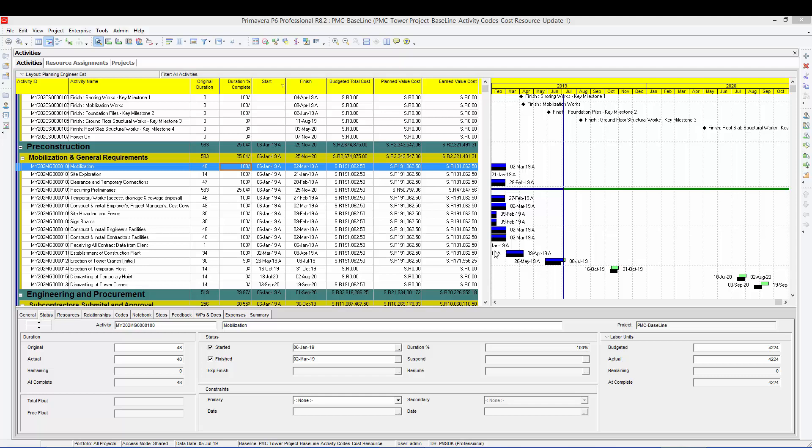What I'm trying to say is in Primavera, when you open an update, you don't know the history. You see the picture as of this update. But in our case, we want to know what happened, what was the progress in every week. So we will copy the updates in different weeks to know the progress for each week.